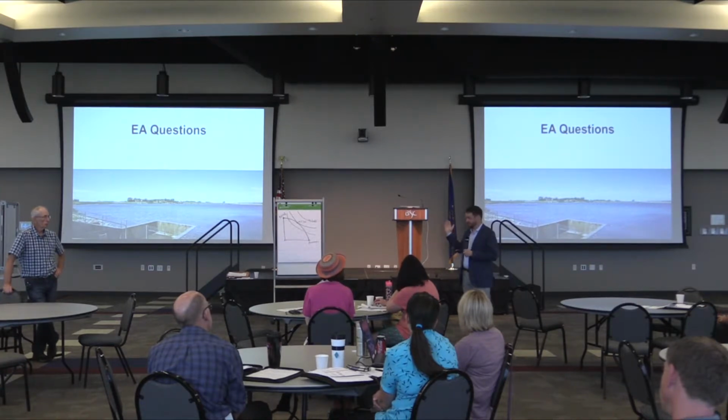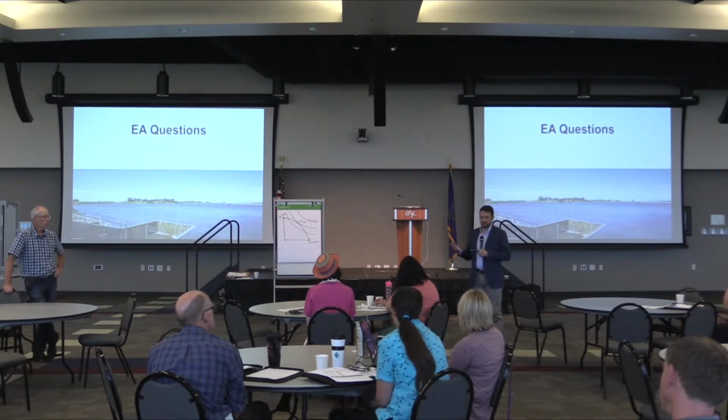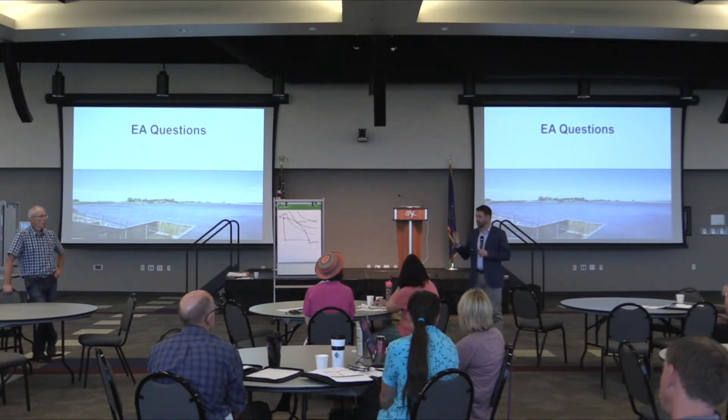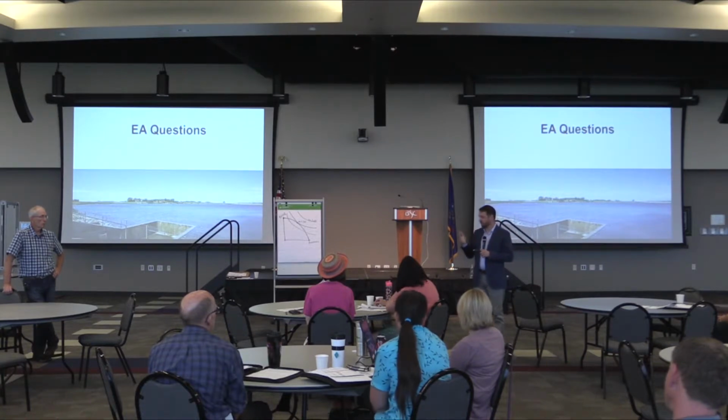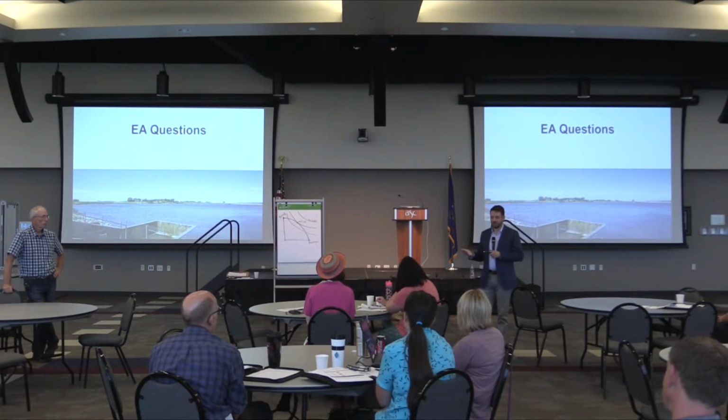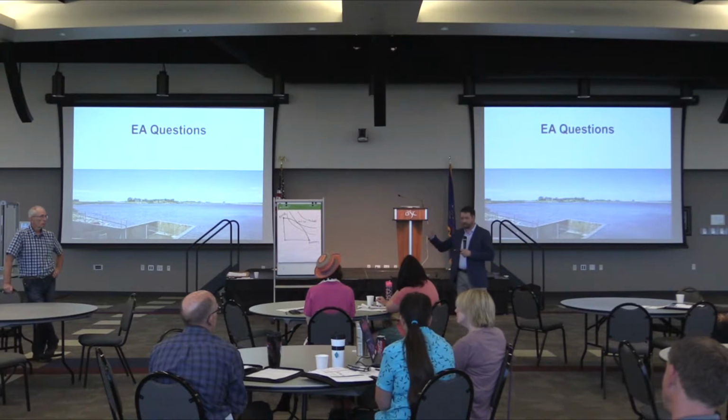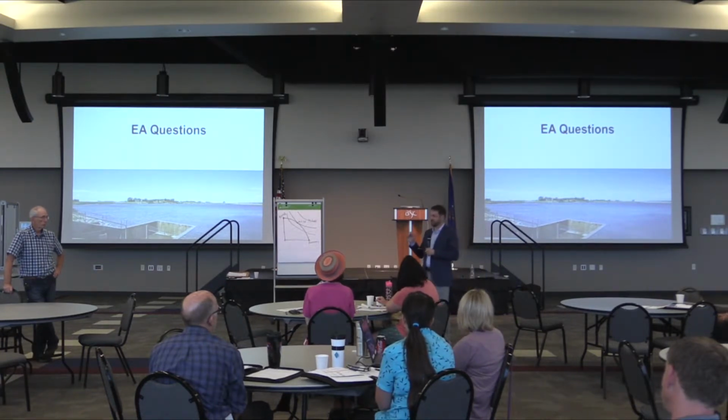Non-use values are huge. If we have 15,000 recreators per year going out and catching fish at $135 per fish, that's the use value, and it's a large value. But now we apply that $5 across 150 million people. All of a sudden, what does that non-use value come to? In this framework, the state economic development framework, we would only be concerned with the non-use values attributable to the population of the state of North Dakota.